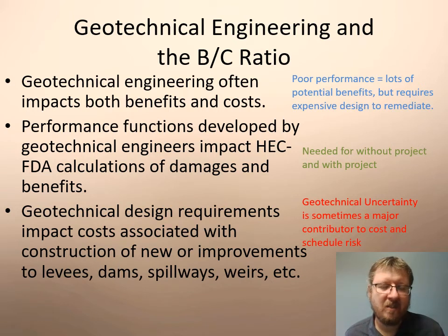So the geotechnical system response curves predict the probability of failure, and they have a direct impact on the benefit-cost ratio in the economic analysis of the project. So if we estimate that a levee has poor performance, that means it has lots of damages. There's potentially lots of benefits for a new project, but it might be very expensive to remediate.